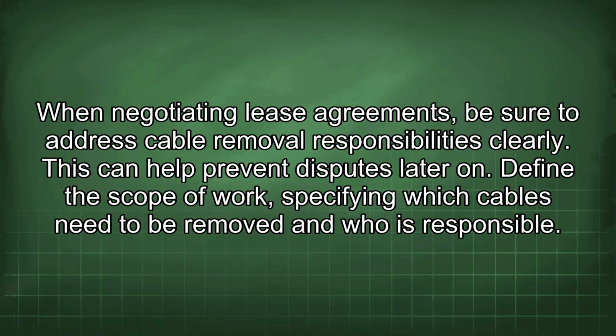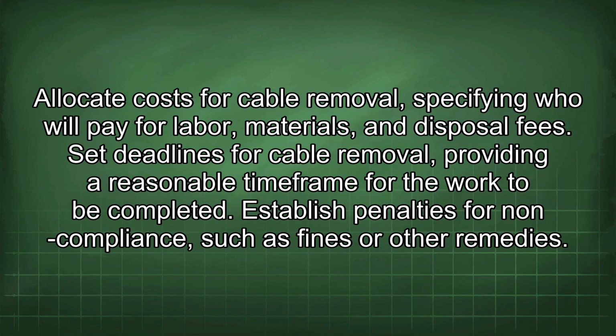When negotiating lease agreements, be sure to address cable removal responsibilities clearly. This can help prevent disputes later on. Define the scope of work, specifying which cables need to be removed and who is responsible. Allocate costs for cable removal, specifying who will pay for labor, materials, and disposal fees.